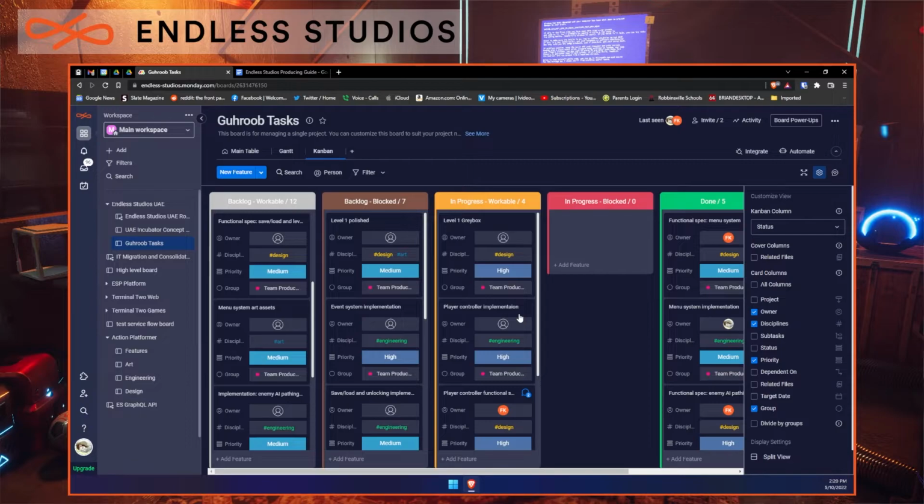Now, you'll recall that I mentioned earlier in the discussion why these statuses are important, and in particular, why it's important that every task represent only a day, maybe two, of work, and we break things down into tasks that are about that unit. The reason for that is the key technique I'm going to use as a producer to see where your progress is at is something called a burn down. How does a burn down work? I'm going to demonstrate it for you in a very manual way here. I will use a report to do it in an automated way, but you'll see how a burn down works